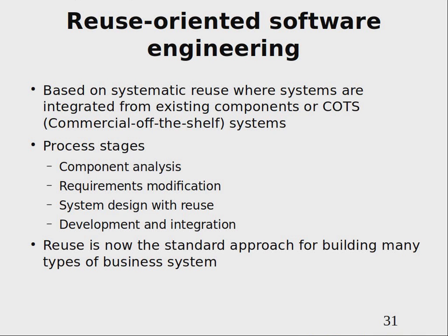Your initial stage is the analysis of components and parts of the existing system which you may reuse in the new project. And then you do what is called gap analysis. Gaps means that there is a gap between the needed requirements and what your existing system can actually do. So you do this gap analysis and modify the requirements, and only then you start working similarly to either the V-model or waterfall model, or with some iterations, when you have decided how to change, extend and reuse this existing system.